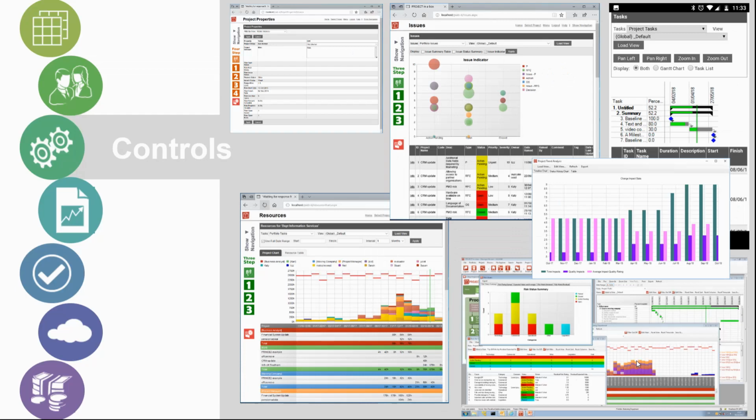Controls are about controlling the project. We have core controls, which would be plans, risks and issues. Issues, of course, includes change management, and plans, of course, includes tasks and resources and costing off the back of that as well. In these areas where you update the file in the project, say the plan, every time you update that, the data is harvested into a central database. So we've got a central set of all the latest tasks, risks, issues and associated data from those, and they're available for analysis, for driving notifications, for feeding into reports, of course, for producing KPIs, etc. And that's also trended as well as latest spot information.